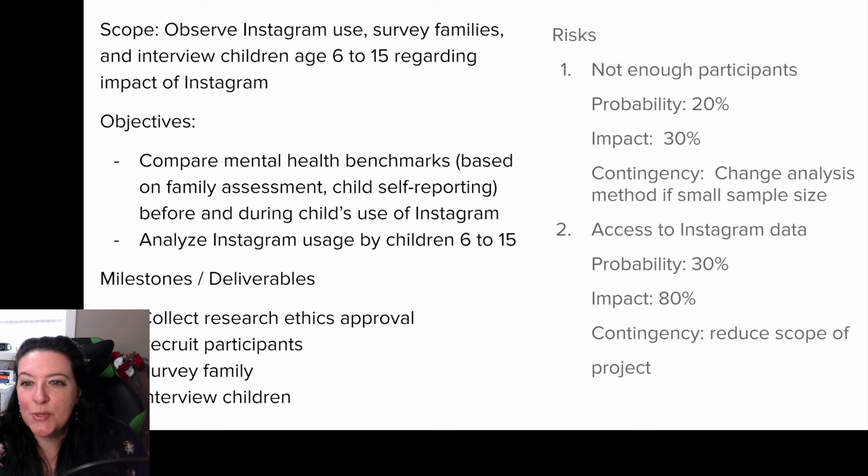What are the risks associated with doing this project and the success of this project? So we might not get enough participants. We think the probability is, let's say, 20%. And the impact on the overall study, maybe it's fairly low because we can then just change our analysis method. We were looking for a bigger sample size to allow for a certain type of analysis, but if it's a smaller sample size, then we'll change our methodology to one that deals more with small samples.